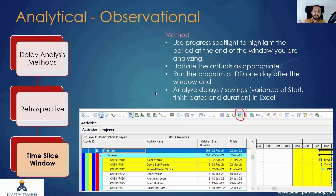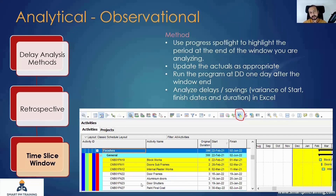When you run the program, you may find, for example, 10 days of delay. The monthly update might give something different because it takes into consideration other updates — like additional activities — which you did not take into account. But you are only analyzing this window. It's a hypothetical approach.